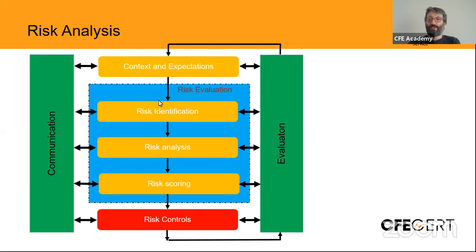And after that, you write down a limitless list of risks which have a potential ability to stop you from meeting the expectations of related parties. So you write down one risk. For example, your customer's expectation is to get a hot pizza in 30 minutes. So risk number one is not delivering the pizza because of a broken motorcycle tire. So you identify this risk.